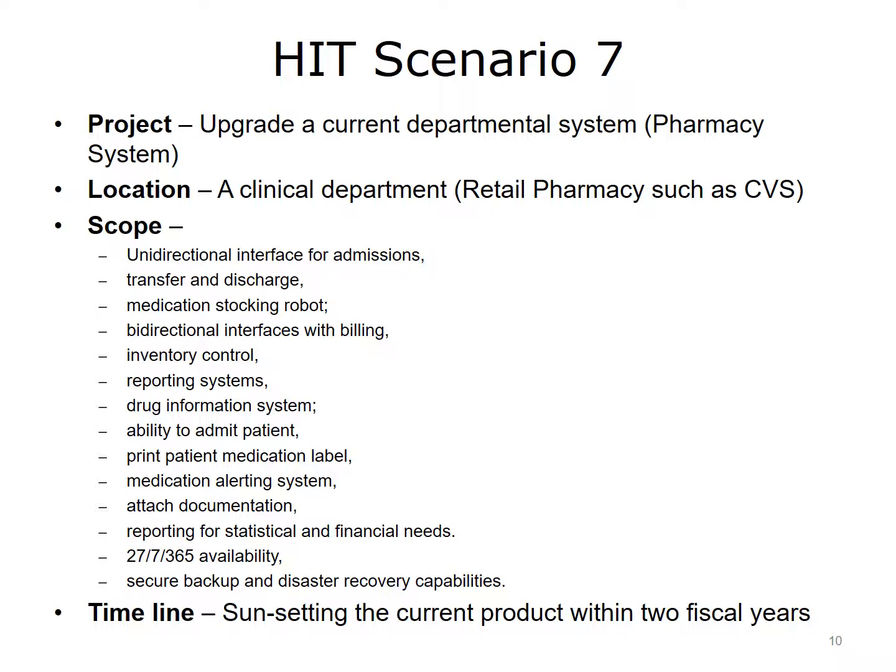Interfaces are needed as well with drug suppliers to balance the risk of stockouts with overlarge inventories. This system needs to be available 24/7, 365 days a year, so your job will be to review redundancy and your disaster recovery plan carefully. Questions to consider include: how robust are your networks? Will the system send information in batches once or twice a day, or will it send it in real time? How is the system updated? These questions become especially important in rural areas where networks can be slow.